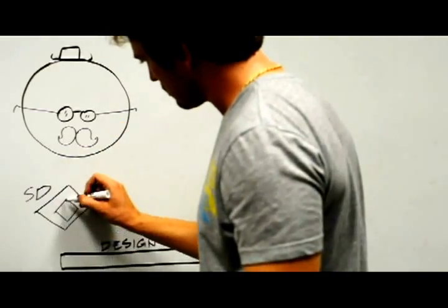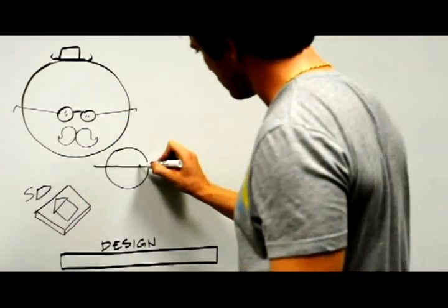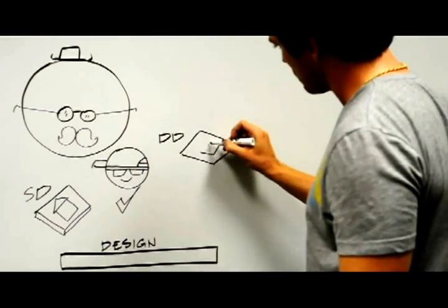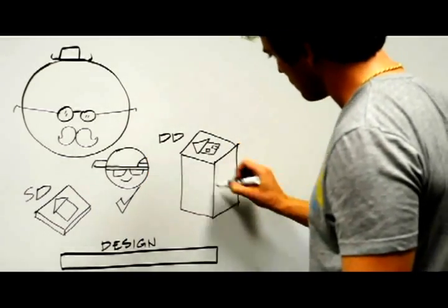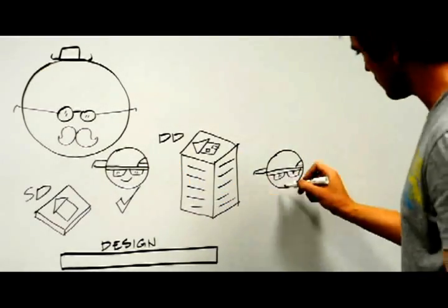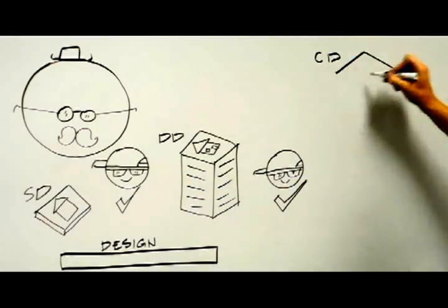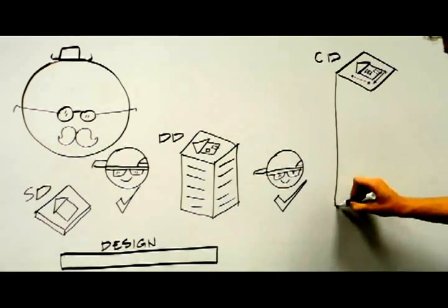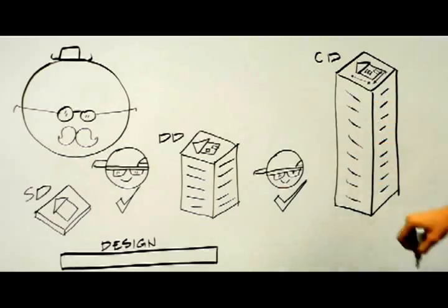After the owner's review and approval, the design entity proceeds to more fully develop the design concept and preliminary specifications during what is known as design development, or DD. At the end of the design phase, after yet another review and approval of the owner, the architect prepares final drawings and specifications, also known as contract documents, or CDs.